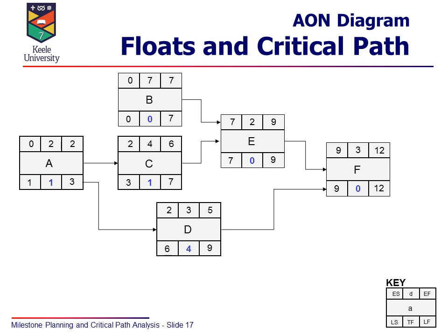Activity B, though, if you look at that, latest and earliest start are the same. We have to start on day 0. So there is no slack, we can't delay, so that's got 0 days of slack, or if you want 0 days of float in it. That actually signifies it's on the critical path, that you have to start it at its earliest start time, otherwise you jeopardize the whole project being put behind schedule.